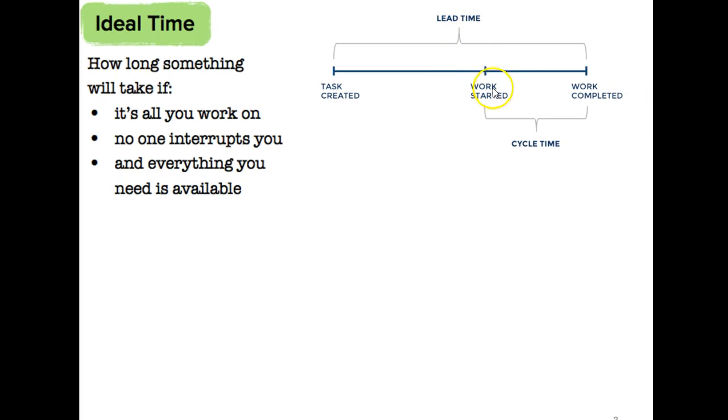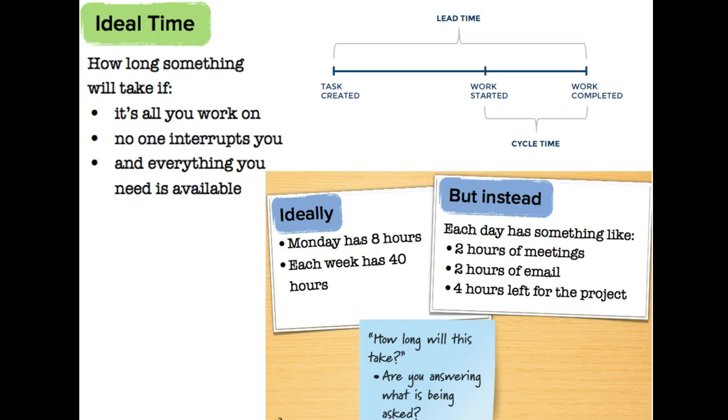Another thing is lead time versus cycle time. Lead time is from the time you add a feature to your scope to the time it's completed. Cycle time is from the time you start working on it till the time it's completed. Okay? So look at our Reginet example. If I post an assignment for you a month earlier and the deadline is in a month, that's the lead time. But it may take you only an hour to complete it. That's the cycle time. And so this is ideal versus actual. Think more about these concepts, and I'll let you think about earned value until I get to the lab exercise.